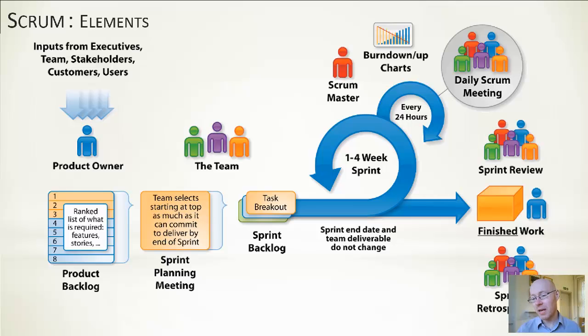And there's often a review and a retrospective. So you think about, well, how did it go? What worked well? What maybe didn't work well? What are the lessons that could be learned that in the next sprint we can improve upon to try to do things better? So it's a reflective process, and that's quite an important aspect by way of enabling it to adapt, to change, to improve.